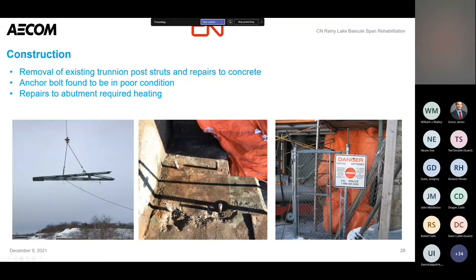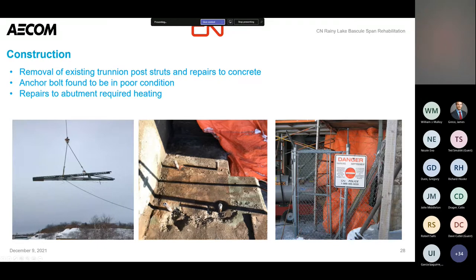The first thing for construction was removing the existing struts — those came out pretty easily, remove the rivets on the tower side, loosen the anchor bolts and pull it out. However, although from our inspection the anchor bolts appeared in relatively good condition, they found they weren't. A couple, when they tried to remove the nuts, actually broke the anchor bolt off. They found section loss at the interface with the concrete, and a few were just spinning in the concrete — they weren't able to get the nut off. So they went ahead and got a change order to replace those anchor bolts.